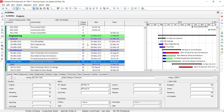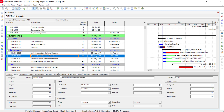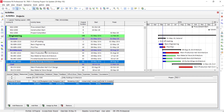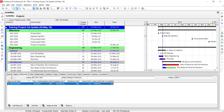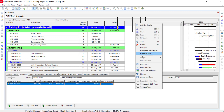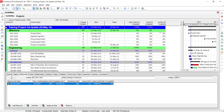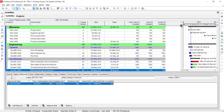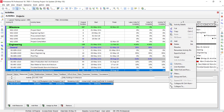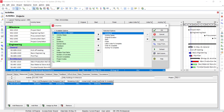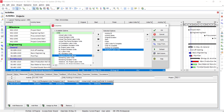Now coming to the Architectural Engineering WBS — I select each activity one by one, change the started date, and go to the Resources tab to enter progress. I can also add columns to see how much progress has been entered activity-wise. Right-click and go to the Columns option to add them. You can see the progress from there as well: 10%, 10%, 5%.